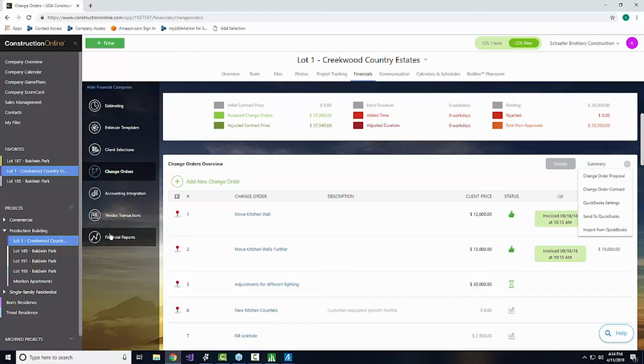And then, of course, last and probably most importantly, put the change orders in. Get your contracts for those, and please stop leaving that money out there or hoping that your customers are just going to open their wallets every time you ask. If it works 90% of the time, that 10% that it fails you is going to be some of the most painful stuff you do all year. So just don't risk it. Make sure that you document everything.